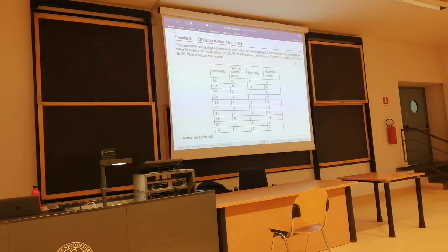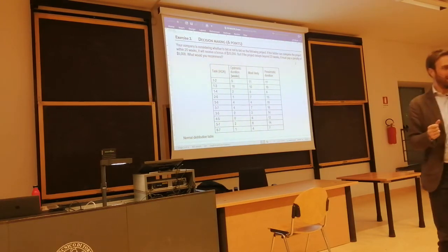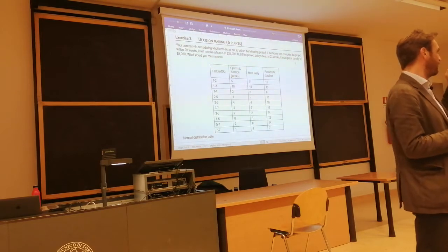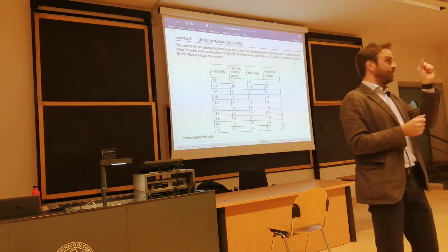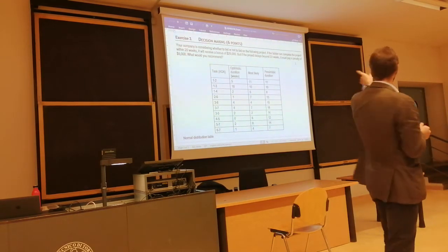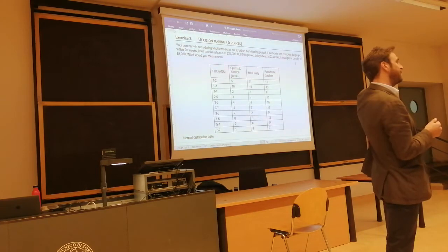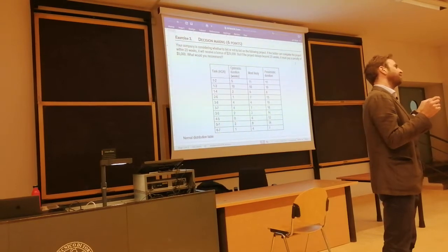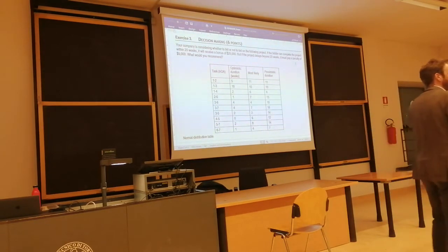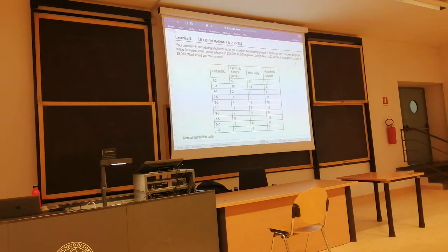Based on that, you know that we use a beta distribution, and you know that the average duration equals the optimistic plus 4 times the most likely plus the pessimistic, divided by 6. While the standard deviation equals the pessimistic minus the optimistic, divided by 6.